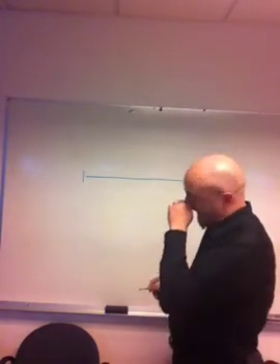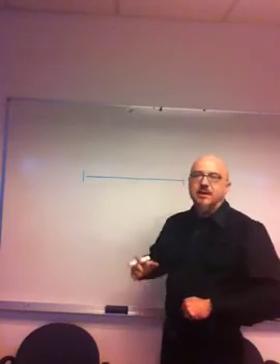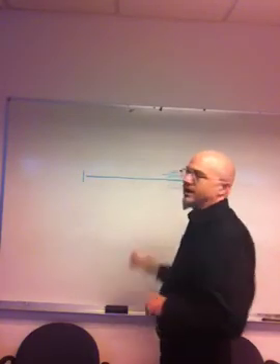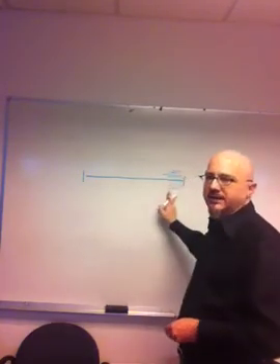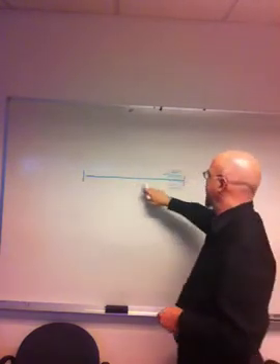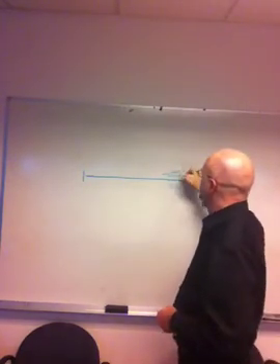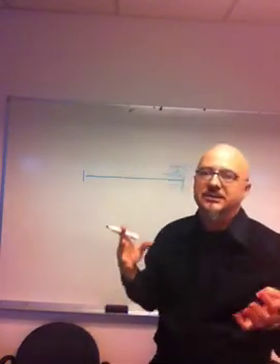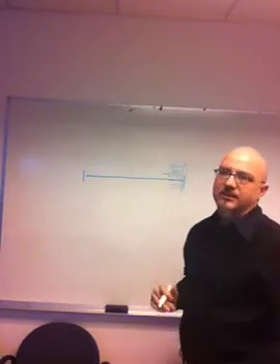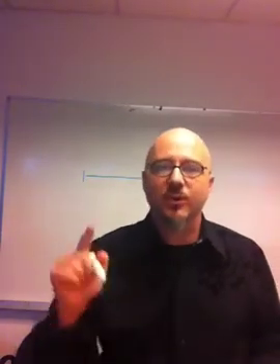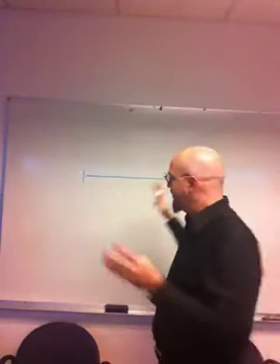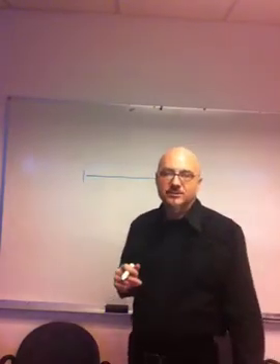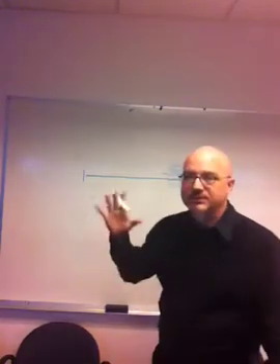There's 2 weeks. And what happens is my QA people end up doing all their work down here, and they're totally overloaded. Right here at the end of the sprint, right? This is the beginning. We're getting ready for demo, which is the last day. And right here at the end, the QA people are pulling their hair out just to get this stuff tested and done. And the problem you have is your stories are too big. I stood right here and discussed this with a project team earlier in this week. Their stories were just too big.